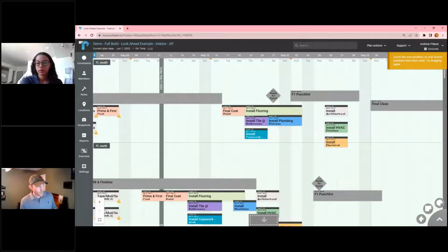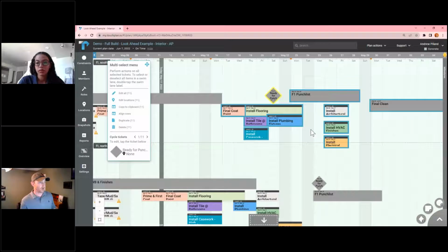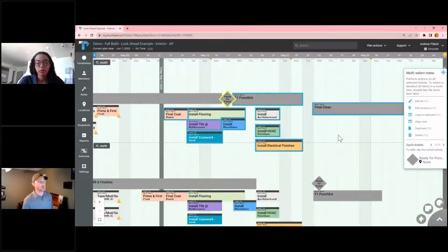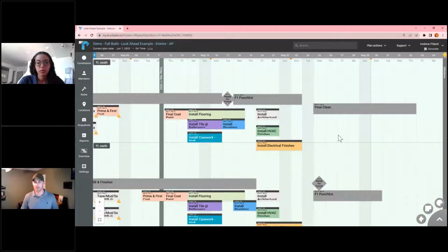So just that quickly, I was able to back that up with, look, you've asked for a change, great. I can make that change happen, but dealing with the supply constraint, here's when I can actually be ready for you and actually deliver this punch walk. And as I peel back the onion on the schedule, I can tell her what that's actually doing to the master schedule as a whole.